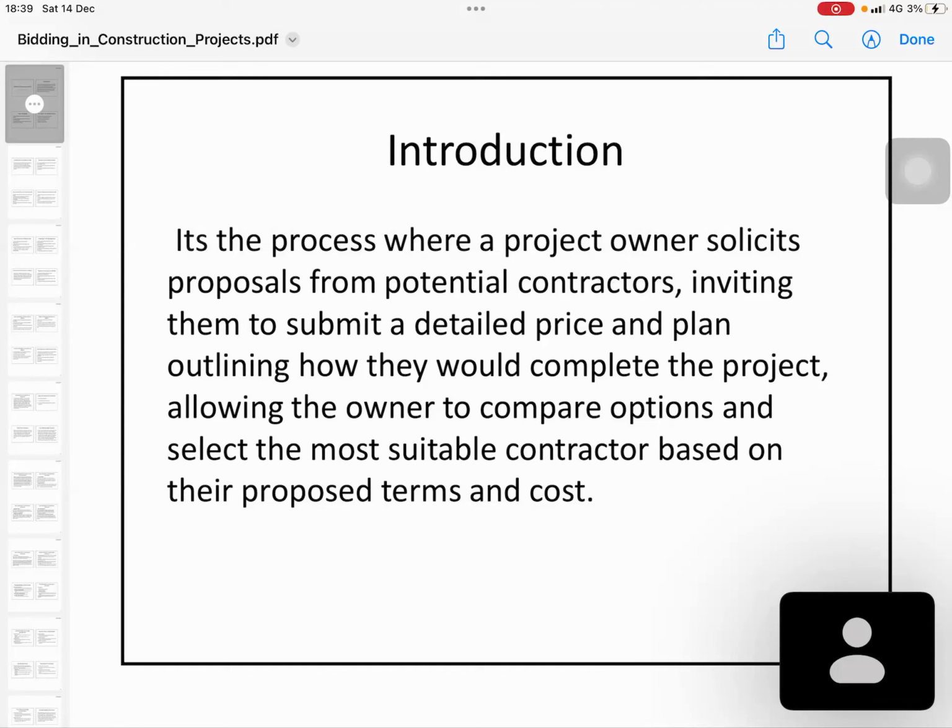Sometimes, as I said, most clients prepare an engineering cost estimate of the probable cost. Sometimes they go for an underestimate. Then the client will give the letter of acceptance, which means he accepts the offer given by the contractor. Once you give the acceptance, an agreement is formed. So this is a different scenario of contract management.